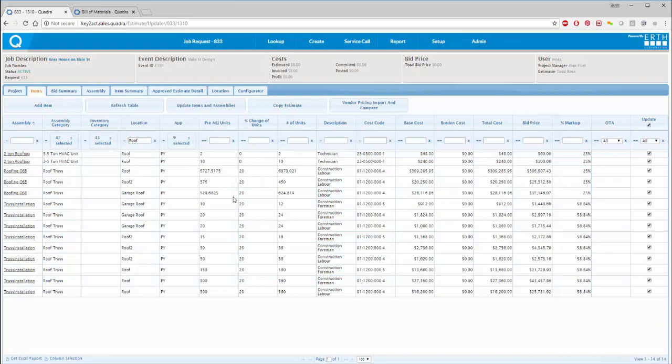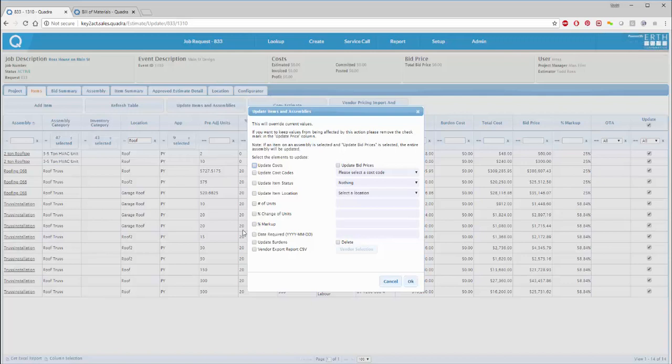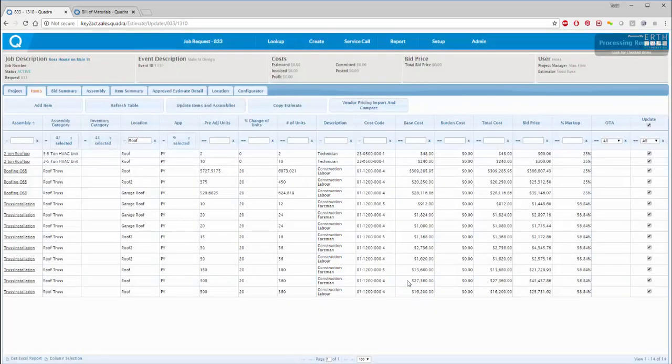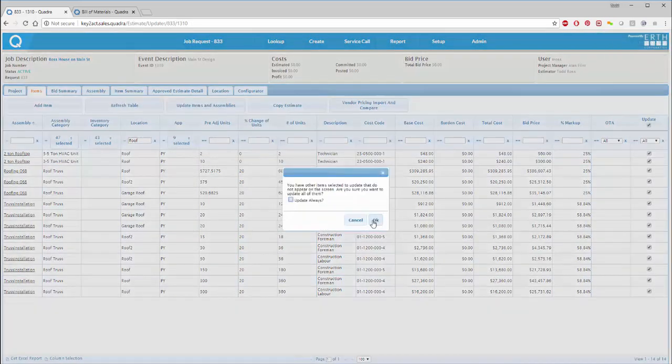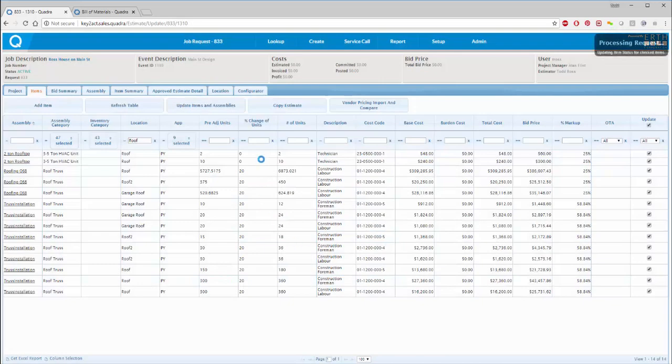They've already factored it. But what I can do is say, hey, I want to set the percent unit to be a 45% markup, not a 20% as we had before. It's going to be 45, because it's going to be done, let's say, during the winter. So it's actually going to take longer. They need more time getting up and down the roof, etc., because of snow potentially.